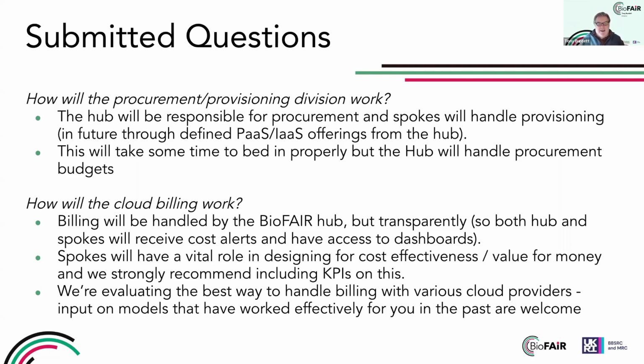But to distill that down, what we'd like, especially for cloud billing, is essentially to collectively block purchase cloud credits through the BioFAIR hub via an agreement with commercial cloud providers, and then allocate that as part of the spokes. So part of your budget will be ring fenced for cloud credits that will have been procured through the BioFAIR hub.